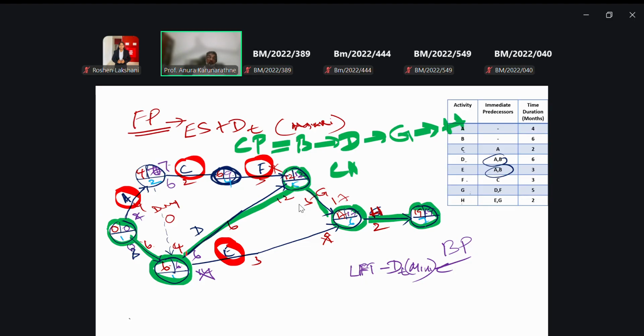To some extent, right? But if we change 1 unit of time from a critical activity, it will affect the finishing time of the overall project, right? That is the idea behind that. I think you got it clearly. Is it clear for you?